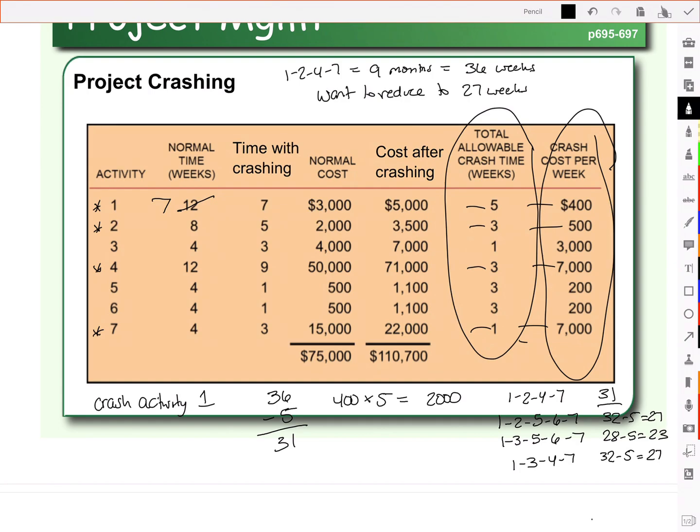We're not there yet. So now we've got to figure out the next thing to crash. So as you look at your crash cost per week, we've gone with the cheapest one. So now we pick the next cheapest. The next cheapest one is activity 2. Its cost per week is 500 bucks. And so we look at how many weeks can we remove from activity 2.